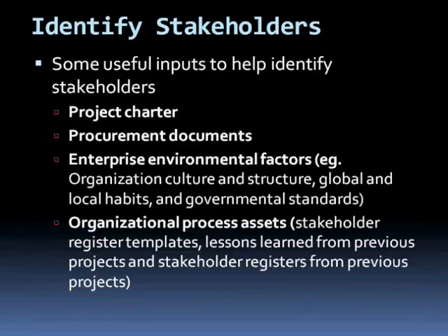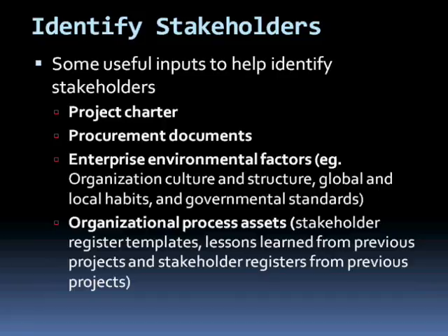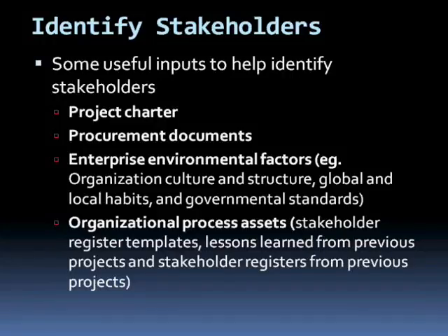Now, what are some of the considerations to effectively identify stakeholders? Inputs to help identify stakeholders. We will make reference to our project charter, which gives a brief summary of what the project is about. In case our project has to do with procurement, then our procurement documents will be an important guide to know which stakeholders are involved in procurements.